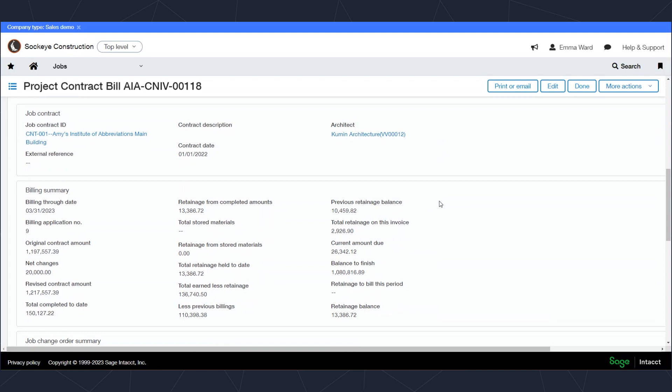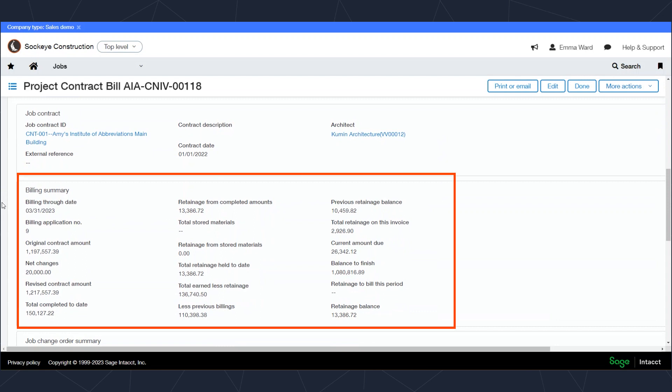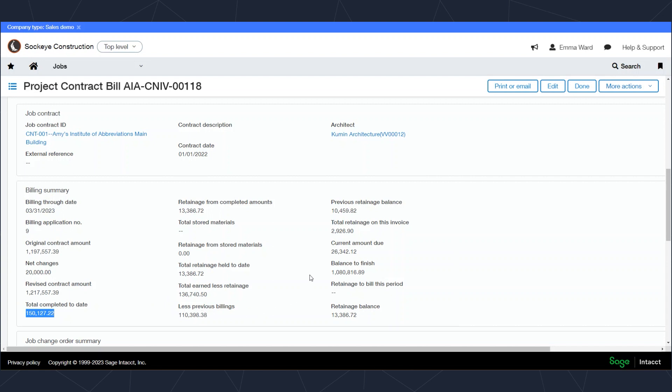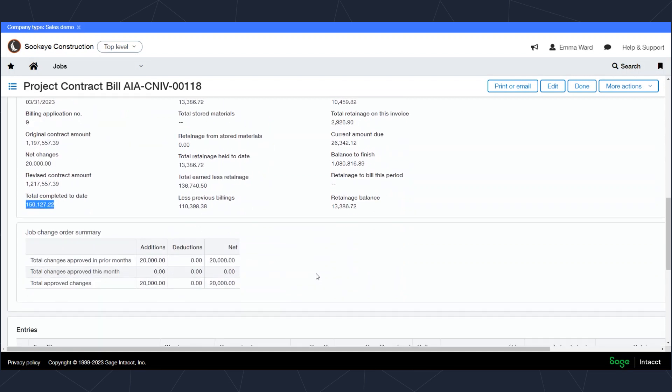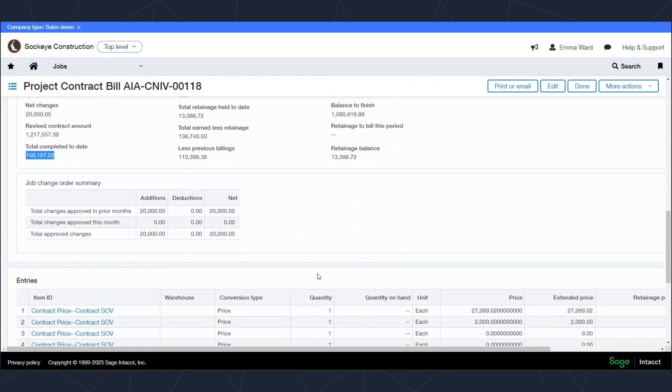As I scroll down through this invoice, there's going to be a few things I'll point out. First is the billing summary here is going to indicate at the time of invoicing, like what was the status of this contract? What was the original contract amount plus any changes? So you have that there. And it also gives you a revised contract total, the total completed to date for the contract, as well as the retainage information, previous billings, and the current amount due and the current amount to finish. So you have a lot of information there.